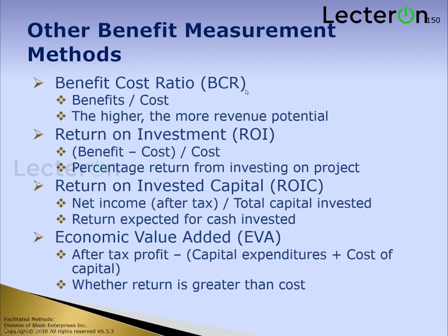Benefit cost ratio. Okay. You're at the very beginning of a project. Should not your benefits that you're going to receive as a result of doing this project be more than what it's going to cost you? Absolutely. So if it's benefit ratio to cost, benefit goes on the top and cost goes on the bottom. Beginning of the project, alphabetically, B comes before C. I'm going to do this later on a little different, but at the beginning, B over C, benefit before cost.